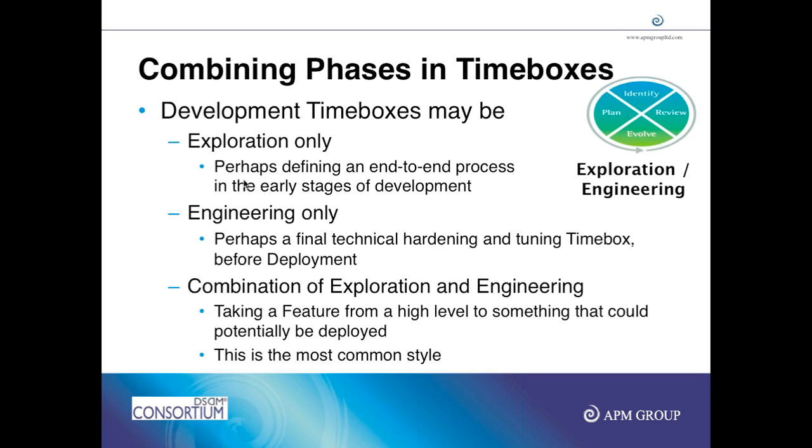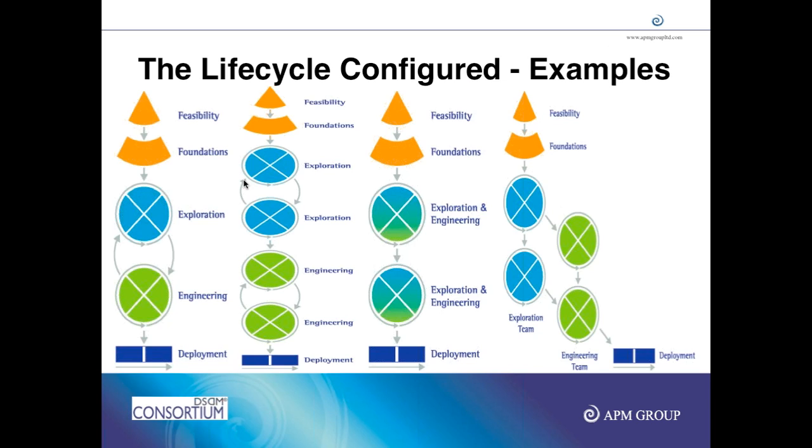This is actually doing one feature at a time. So you just take payments. Instead of doing all the analysis about payments, you can do a little bit of analysis, design, development, testing. So for example, only PayPal goes live in the first release, and in the second release you support cards, and in the next release you support printing, and so on. So you have exploration and engineering, which is practiced popularly across the world.